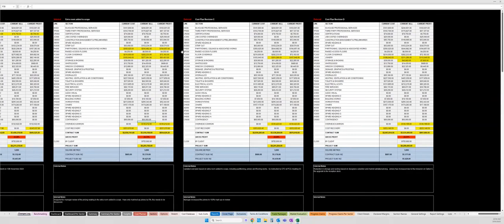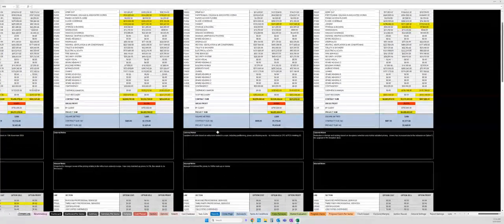You can see in this scenario, the only change between the external and the internal is joinery has been increased. So where the user priced joinery at $277,000, the manager's gone in and made some adjustments on the sell side to increase that to 301, which is showing an increase in profitability from a percentage side and a dollar side. It's interesting to note on the internal notes, we're noting that the manager increased the joinery to 100% markup on review. So we're documenting the internal changes.